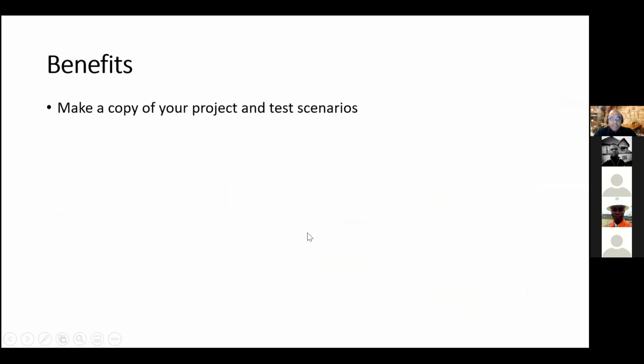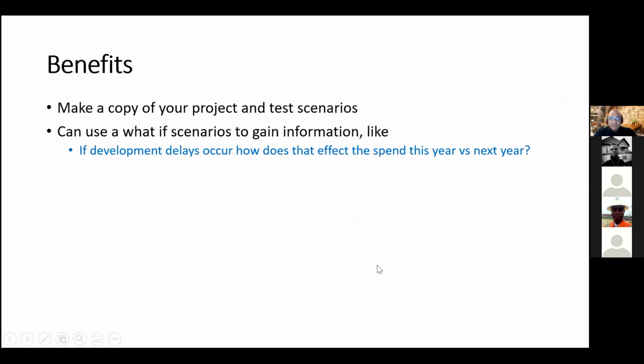Okay, so you make a copy of your project. And you can use that copied version to create what-if scenarios, if you want to gain information. For example, if development delays occur, how does that affect the spend this year compared to next year? You can calculate all that in Microsoft Project.